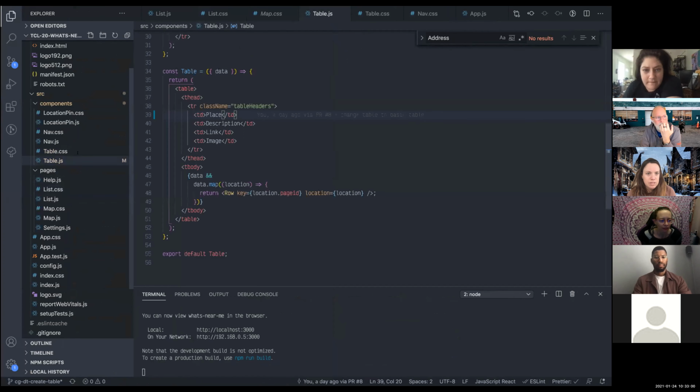And it tends to introduce friction. There's some coordination costs. There's a contract that needs to be made between the front end and back end. Whereas if you have a back end and a front end engineer working together on one issue that provides user facing value, then those coordination costs are reduced, and when it's done, you're actually providing something to end users, right? My little example here is a little absurd, but as a developer, I want to type the letter C for const, so I can start the process of assigning a variable, clearly taking it too far.